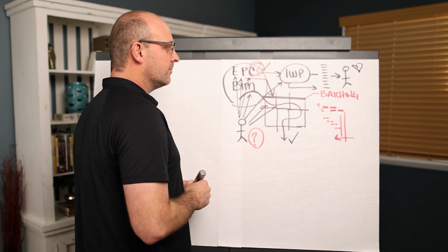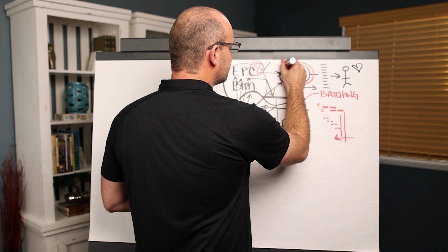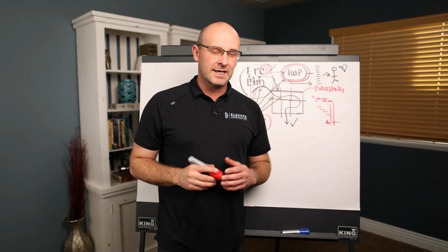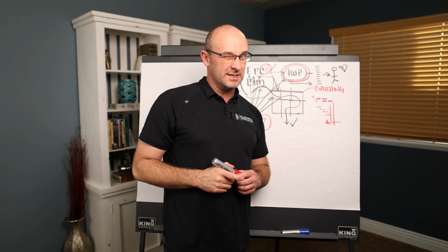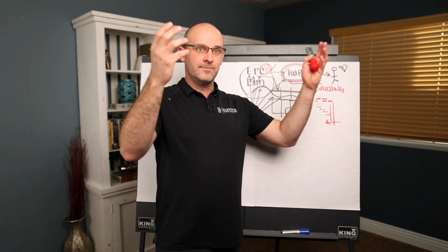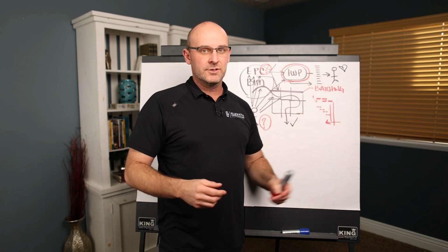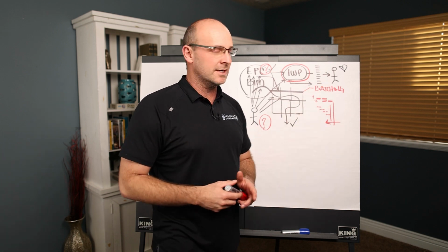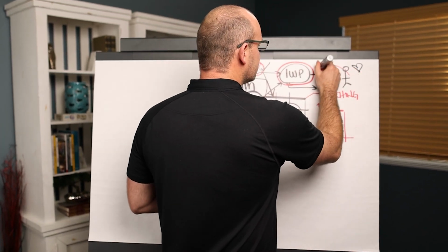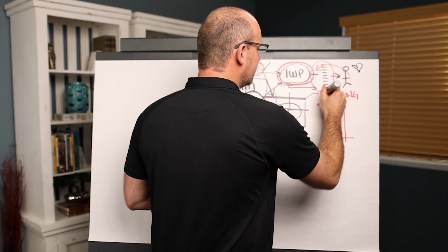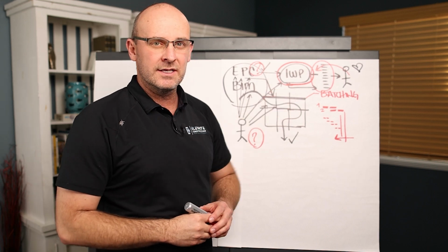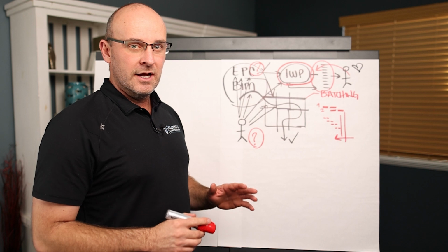The other thing that I have a problem with is that if somebody else is preparing the installation work package for the foreman in an oil and gas situation or MEP situation, that makes sense because you're literally putting up pipe or pre-kitting assemblies or pods or modular construction or large prefabricated sections. But when you're doing it in commercial construction, this foreman has got to play a part in this planning, and I don't like the fact that WorkFace planners are doing all of the installation work packages. So that's not a favorite thing for me.